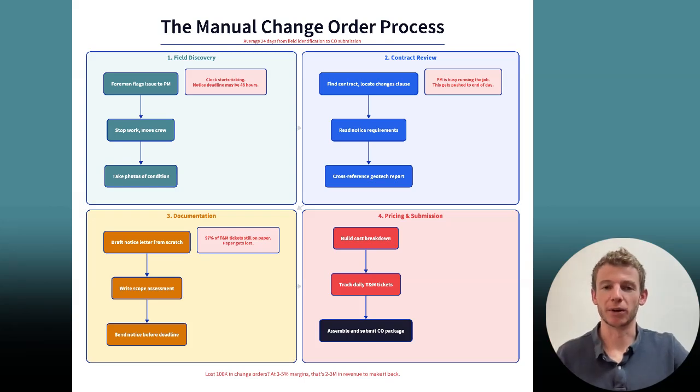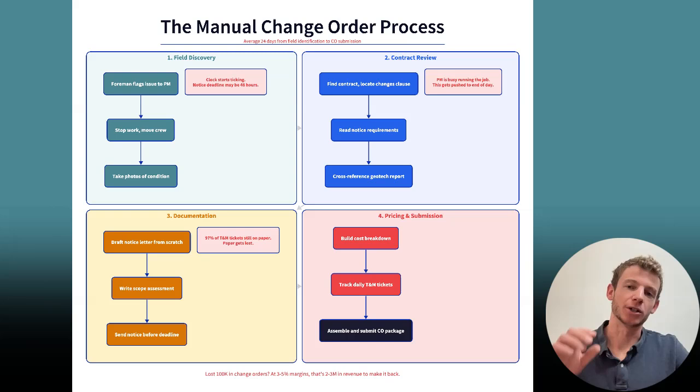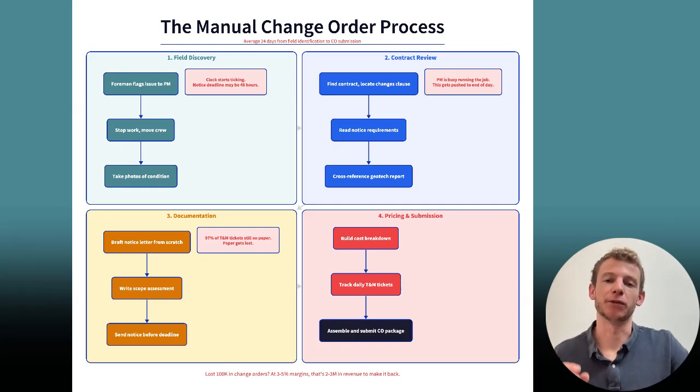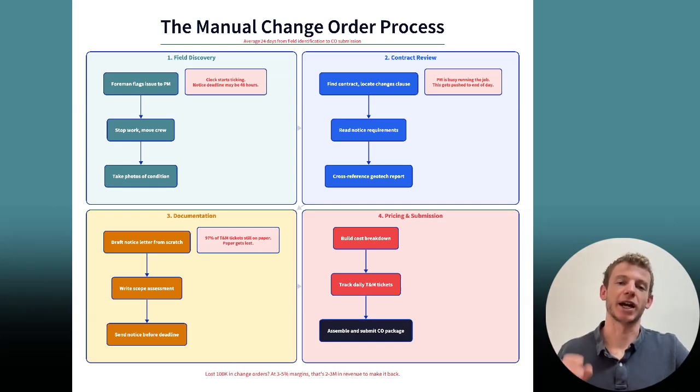The geotech report said it was native clay. The contract drawings show a clear pipe run. Nobody knew this was in the ground. So this is when the clock starts ticking. You know your contract says you need to provide prompt written notice of differing site conditions. Miss it and you risk waiving your right to claim additional costs. The contract is specific: you must notify before disturbing the condition further, so the client or engineer can inspect it.